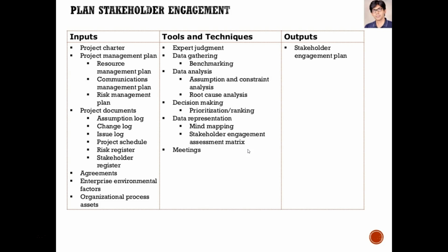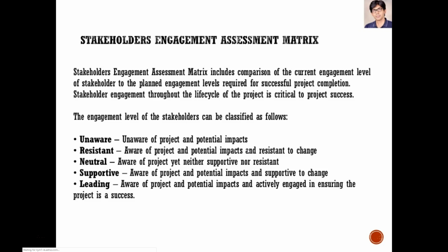So we need some tools. Now we're looking at that idea, that plan. There is a tool here called the Engagement Assessment Matrix. You're going to see this one show up a lot. It covers the engagement level of the stakeholders. So, unaware. They don't even know if a project exists or impacts them. So they don't know about it.